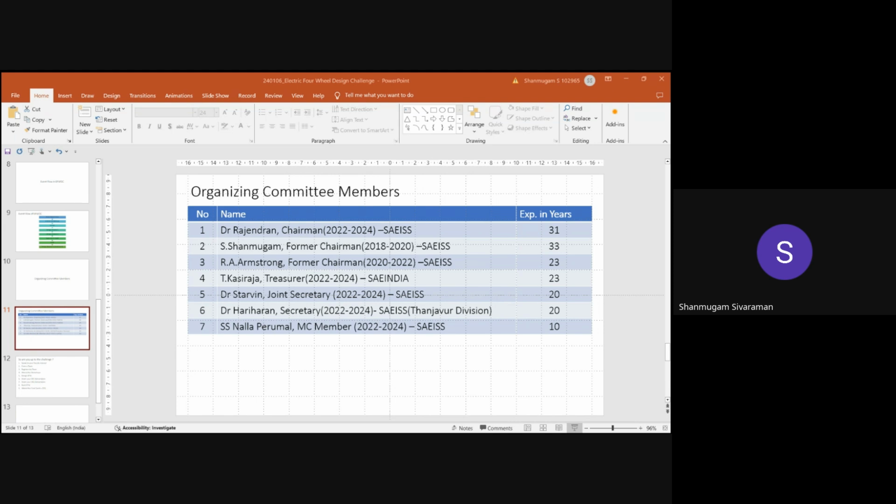Then you have the DR2, design review 2 deliverables, get feedback from industry volunteers, get approval for build, then build the electric four-wheeler, and finally attend the final event. So this is the sequence of events we planned for this competition.